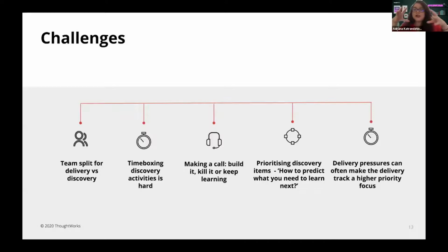But even when you have one team and it's a cross-functional team that owns both tracks, you still experience the splits, just because in practice, you have people that are naturally more involved in the discovery bit and people that are naturally more involved in the development one. A way for us to overcome this was to have the so-called bridge roles. And in one of those teams, I was in that role. Usually that will be someone like a business analyst or a product specialist or manager, whatever you call it in your organization, or maybe a product designer, some person of that shape who will bridge the two tracks and make sure that there is balance between the two, and that they do actually go in parallel.